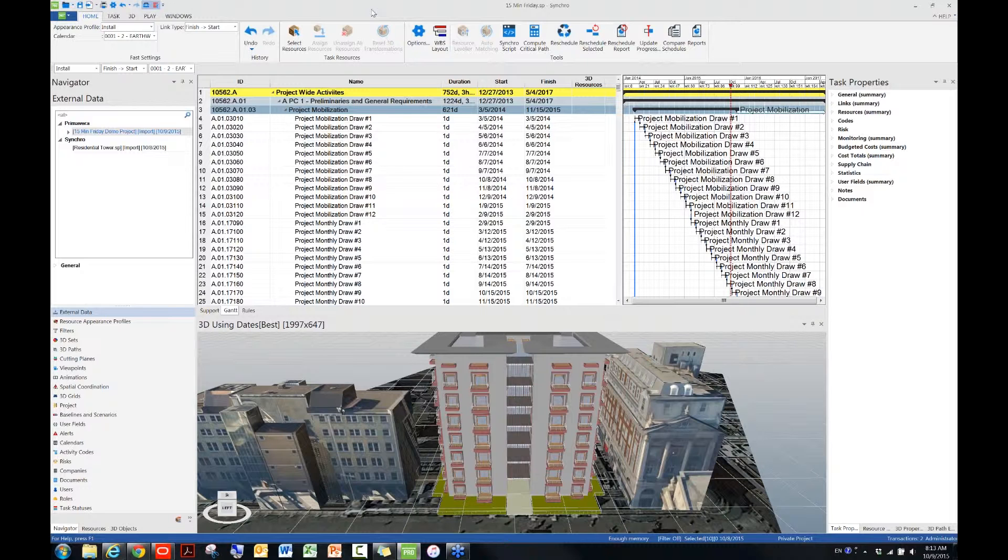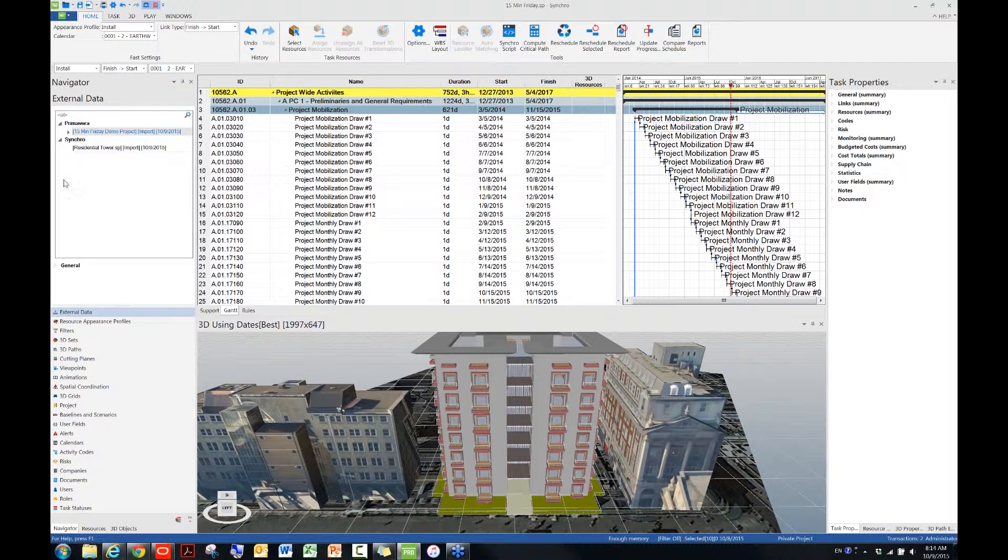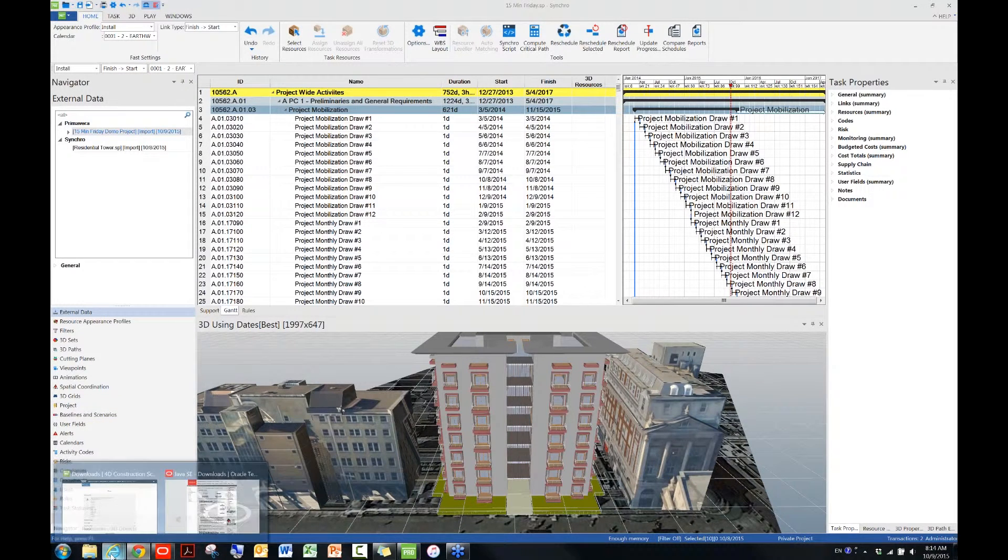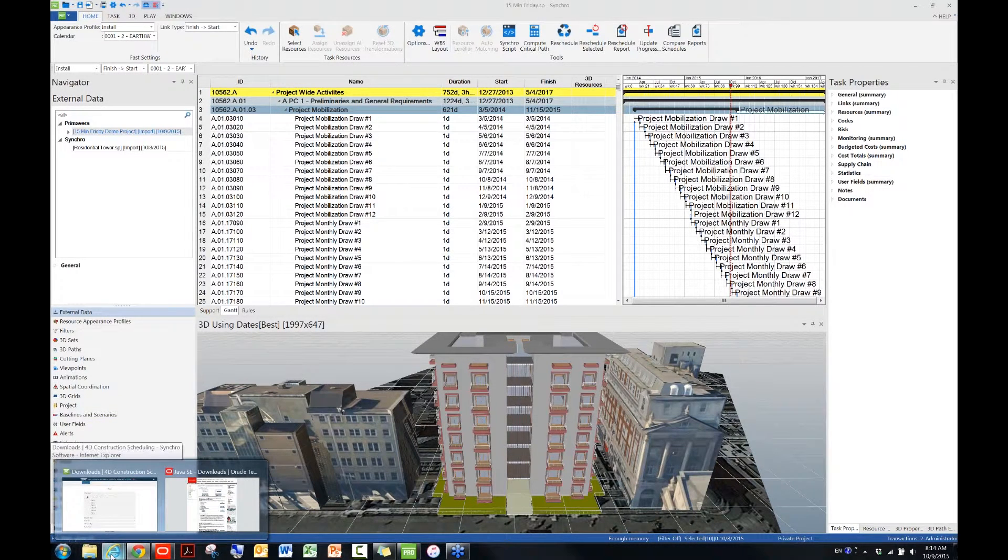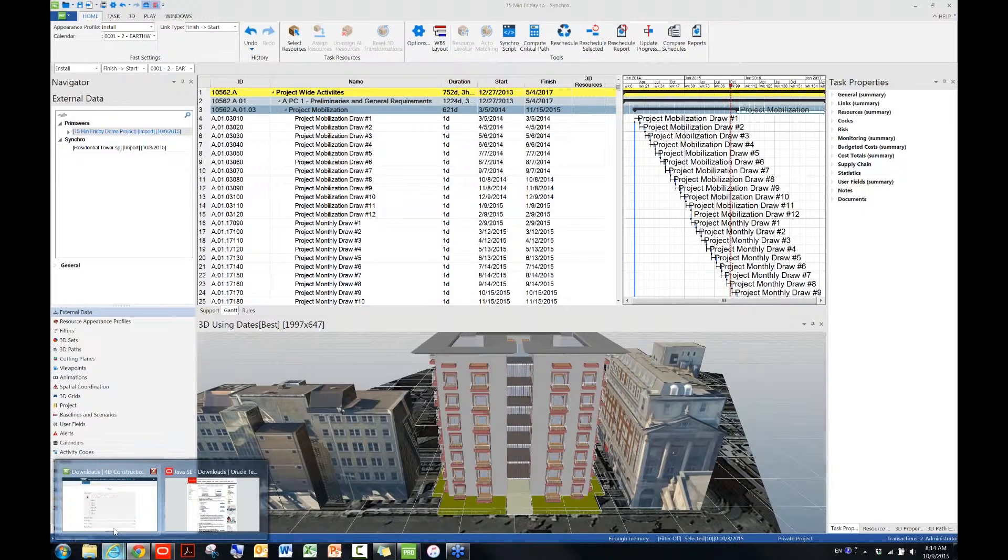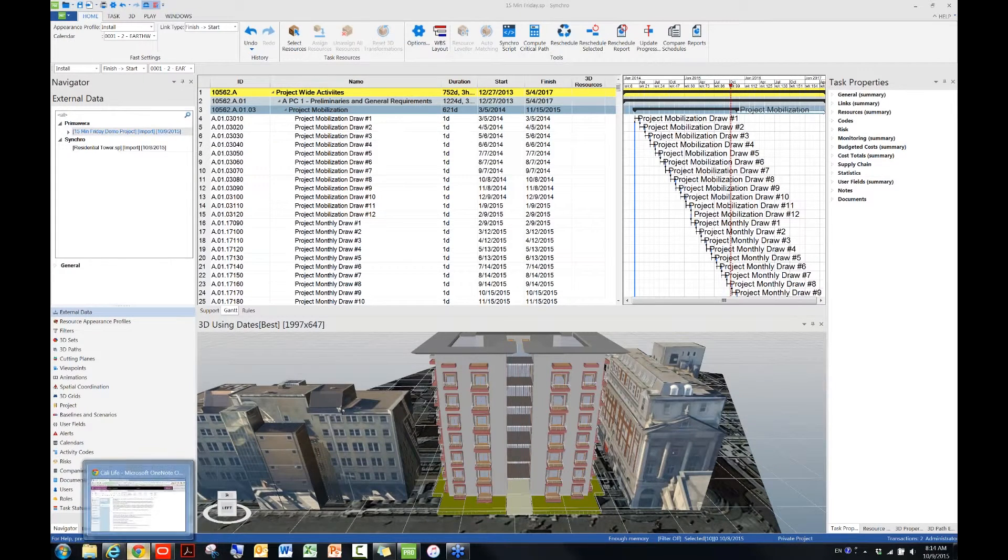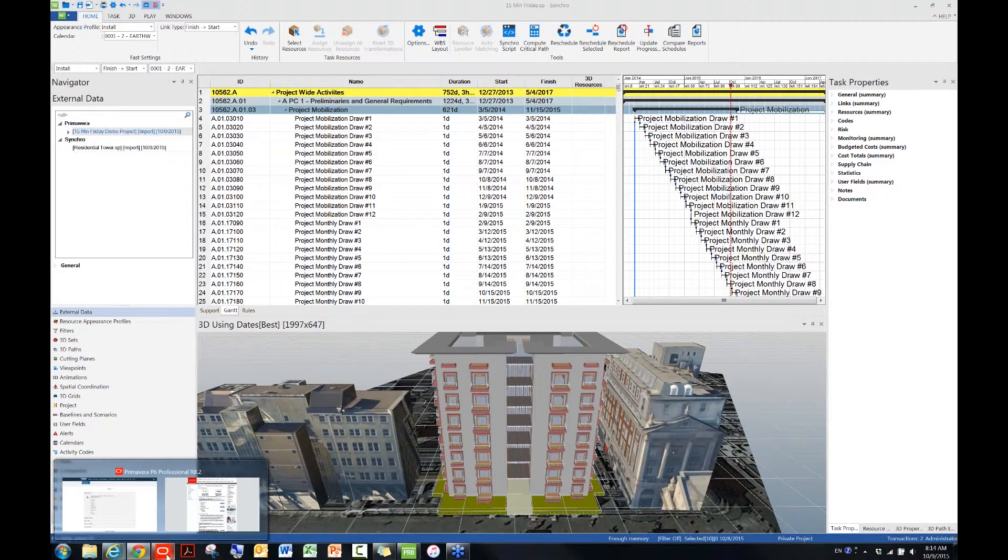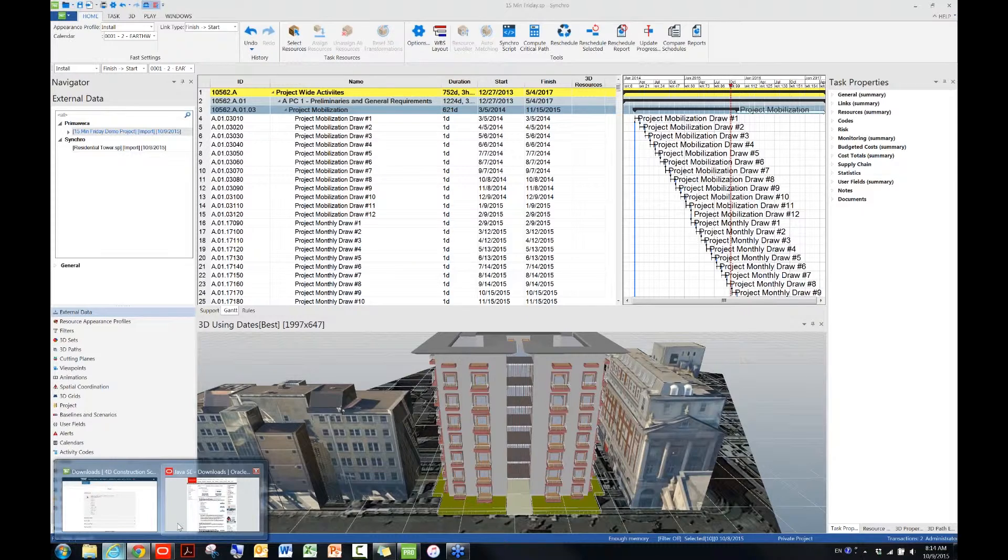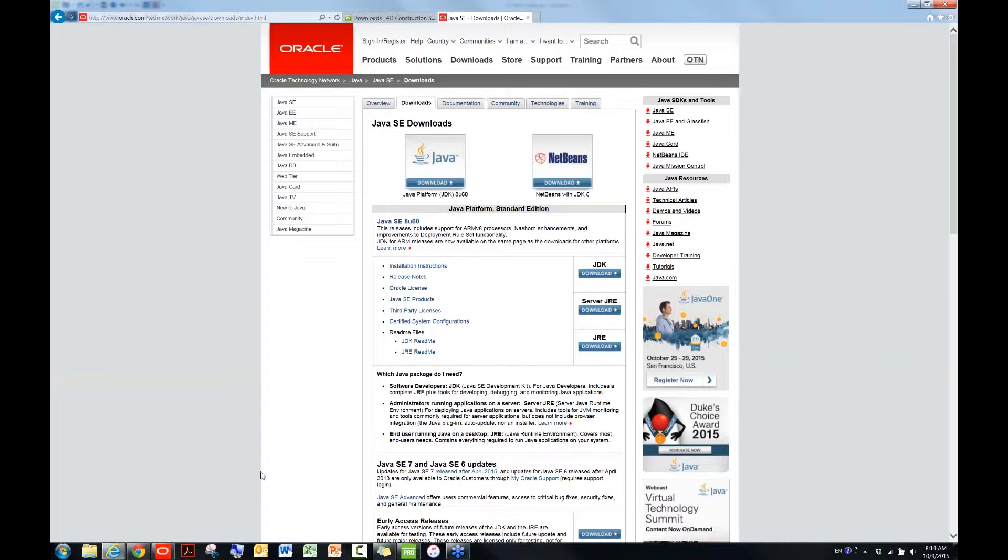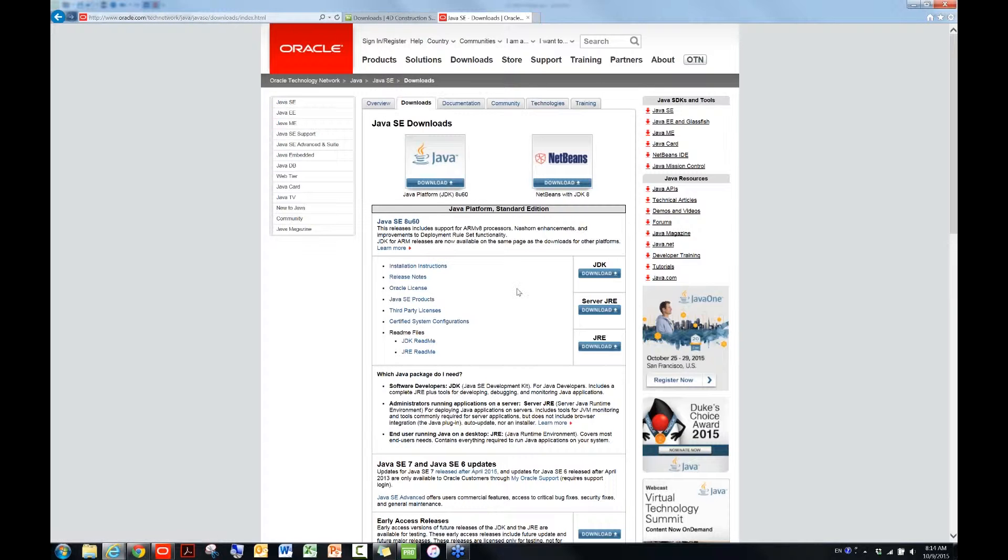Okay, we have another couple minutes. Another question, why is P6 XML export, why is the option grayed out in My P6? Okay, I had this question before, so the answer to that question is that this is not a Synchro issue. So basically, you want to go to Oracle's website, which is this one, to download the latest version of JRE, and then make sure that's installed on the computer,